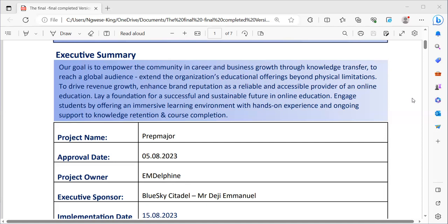So for instance, this particular sprint, their goal is to do the core functionality of the application. For the first sprint, they were meant to do the front page of the application. The second sprint, they were meant to do the footer and the header. The third sprint, they are meant to do the core feature. The last sprint is also for registration and authorization as well. So for this one, as a student, what are my core features?